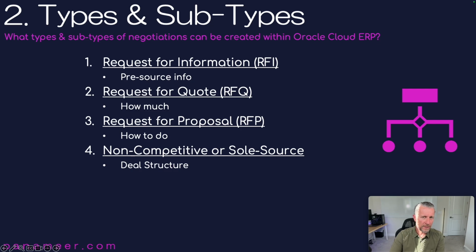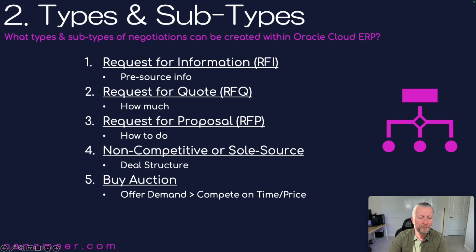Well, sometimes I just want to ensure that the requirements the contract needs can become requirements on the sourcing event, so that I know before I award to you that you're going to be able to meet the requirements for the contract. I've even had some clients who will create sourcing templates that are wholeheartedly just aimed at getting you to say you'll do a drug screen if you come on site, or something very specific.